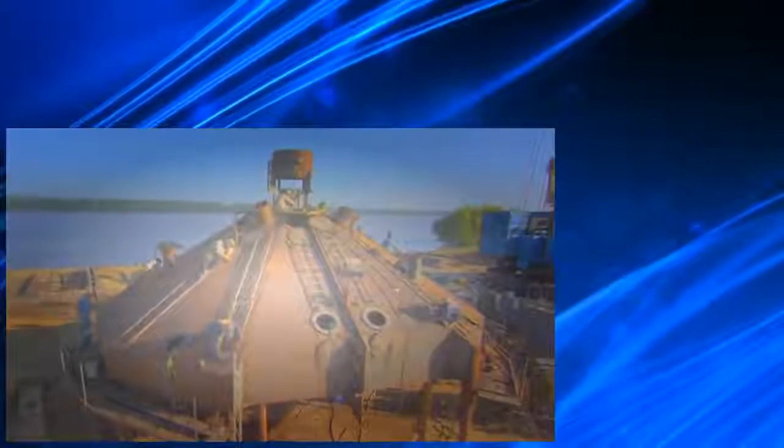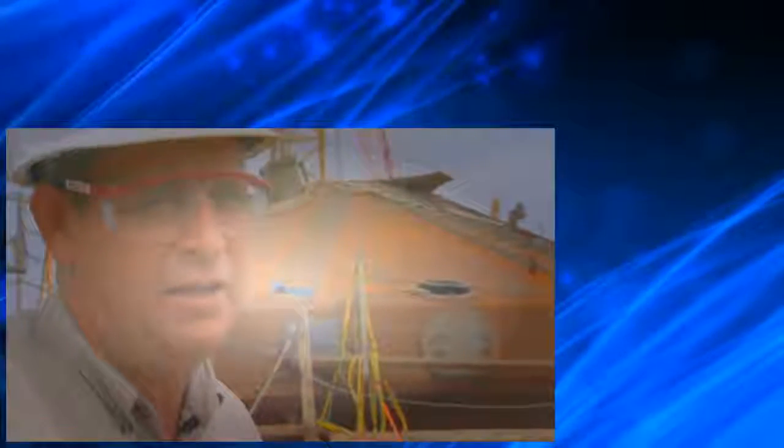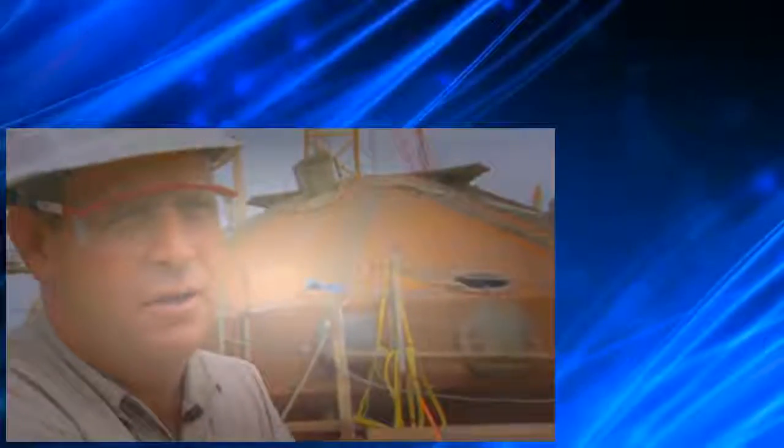Today, 3 days before the scheduled lift, here they come. The crew is working feverishly to finish welding the spud can. The first spud can is supposed to be set on the 14th of June. And if we make that date or beat that date, we're doing okay. But if we start falling behind, the only way to compensate is to work more hours and work overtime, which costs more money.